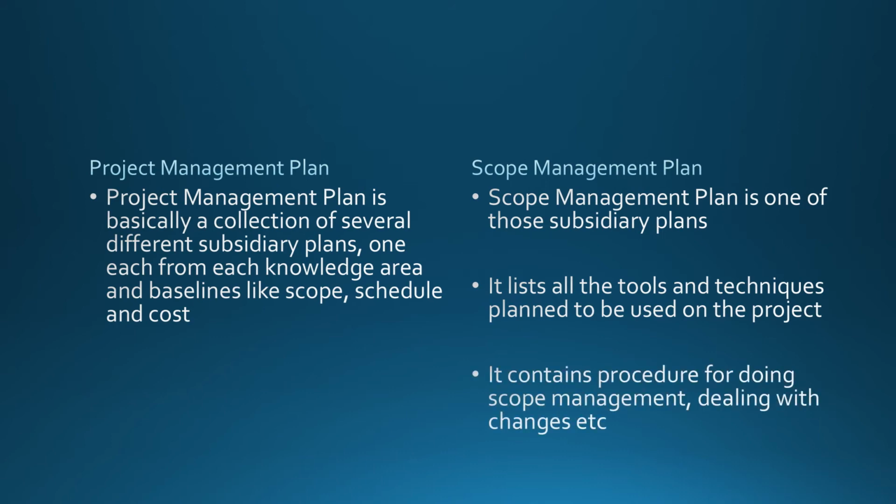Your scope management plan also contains the procedure for doing scope management, right? So what are the processes? What is the procedure that you're going to follow to do scope management? How are you going to deal with changes? Is there a separate change management plan that you're planning to prepare? So things like that, all of that will be mentioned in your scope management plan.